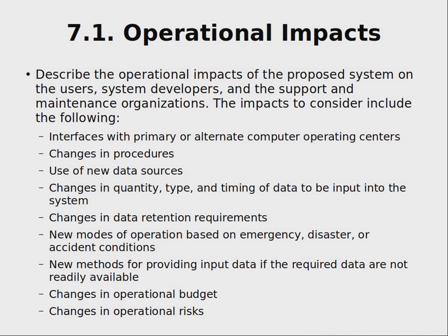Therefore, to be safe from being sued by your customer, claiming it was your responsibility and your fault that this system was not implemented on time, on budget, and with the required quality and features, you need to describe in more detail what the constraints are, what the risks are, and what the not-so-good things are about this new situation rather than only the good things. Of course, it may happen that in this case you will not win this particular bid. But we will talk in more detail later.